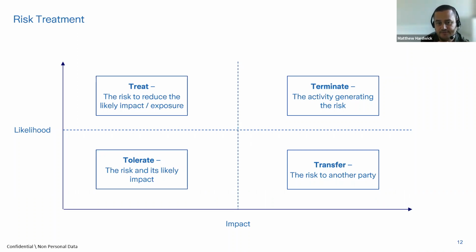And what it suggests is where we've got a high impact, high likelihood risk, we should terminate doing the activity that is giving rise to that risk. Great in theory. The reality is we may be doing something that we cannot terminate. It's part of our duties to deliver this. It's naturally risky. There's a very high impact on the organisation if it occurs, and indeed there's a very high likelihood that we think it's going to occur, but we cannot terminate, which means we've got to do one of the other 3 options. Chances are you're going to do a multitude of those. You may try all 3. You're certainly probably going to try treat and ultimately bring it into an area where we're tolerating this particular risk.